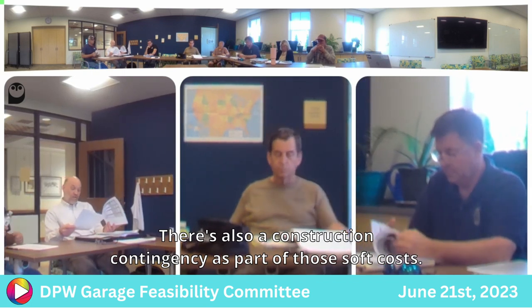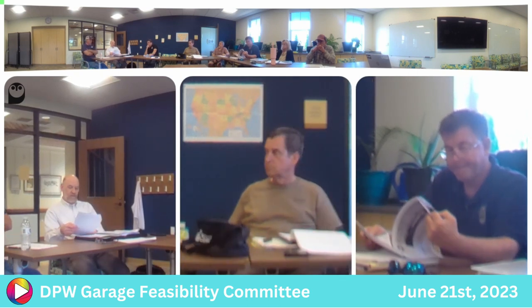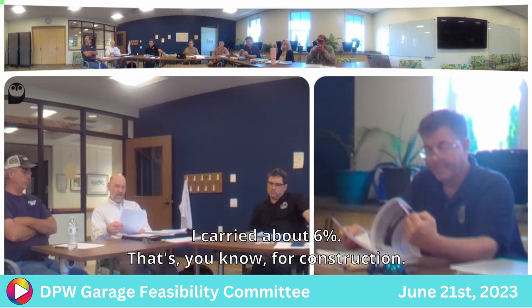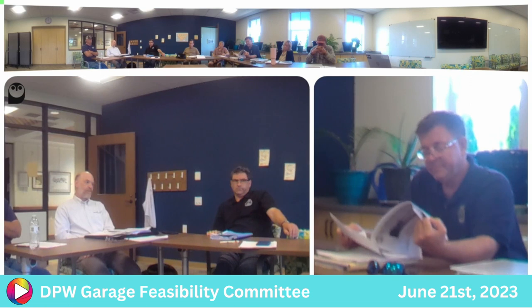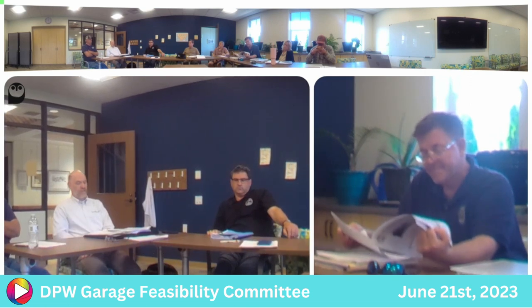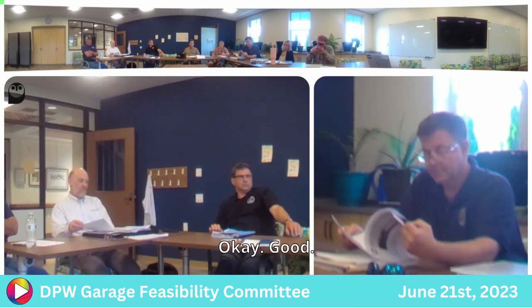There's also a construction contingency as part of those soft costs, and I carried about 6%. That's for just unknowns during construction. Okay. Good.